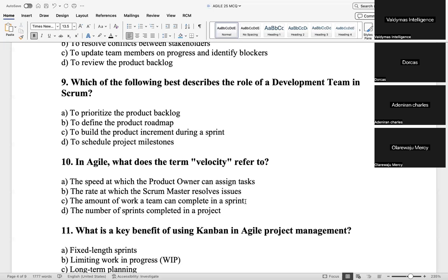So I've been begging my dev team lead to please quickly prioritize all those early stories into the first sprint. And we have a 3-week sprint that will last until October 29. So that means I must pack all those 30 stories into the first sprint, which is risky because the chances of us completing it is slim. But out of that 30, you now have to reprioritize the things that are far more important. Those are the ones you ensure you're tracking every day up until that day.